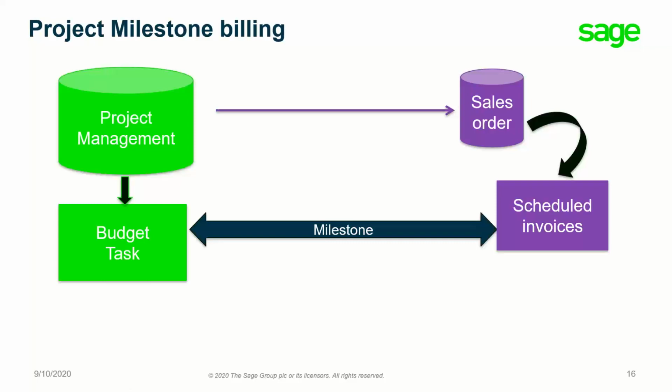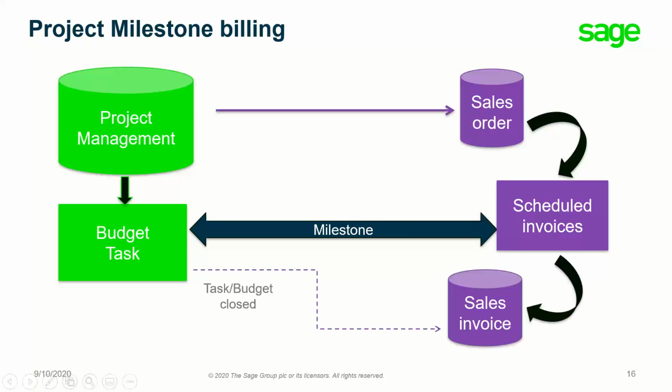But as a project manager or as a project accountant, I have to decide which milestones of my project should be associated with my scheduled invoices. Once my milestone is closed, I will be able to invoice my customer on the tasks that have been completed.